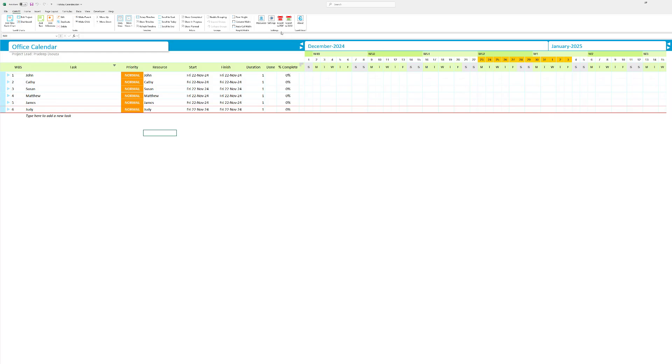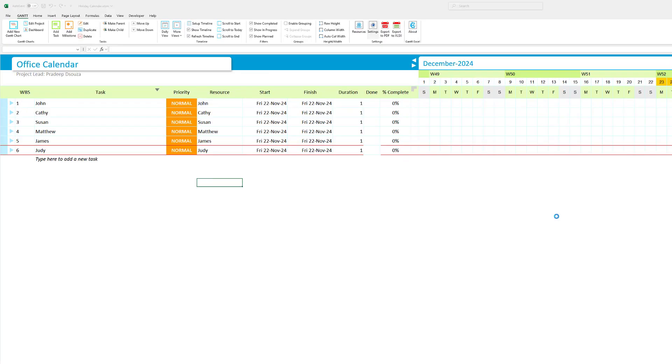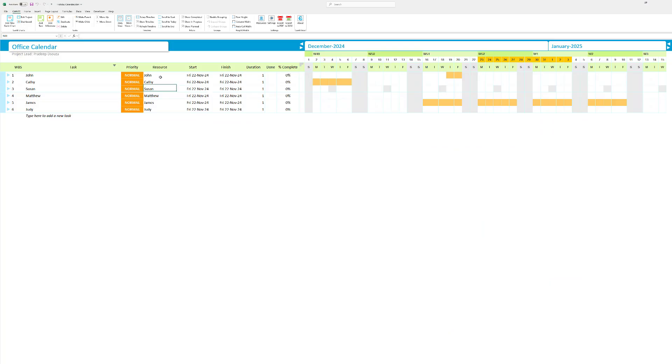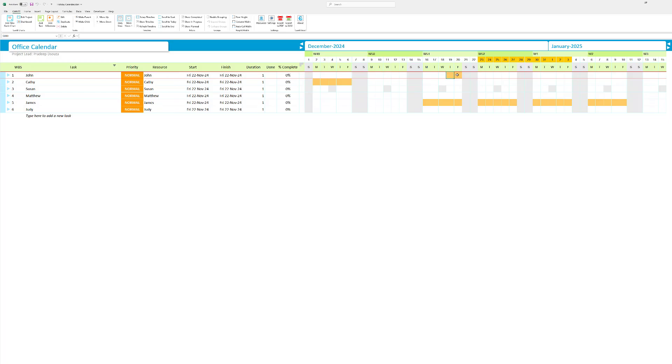So what I need to do is click on settings and select highlight holidays per resource and also highlight non-working days per resource. And you can see here now that John is on holiday on the 19th and 20th. And then he's pretty much off based on the organization holidays. Kathy here is on holidays from pretty much in the first week.